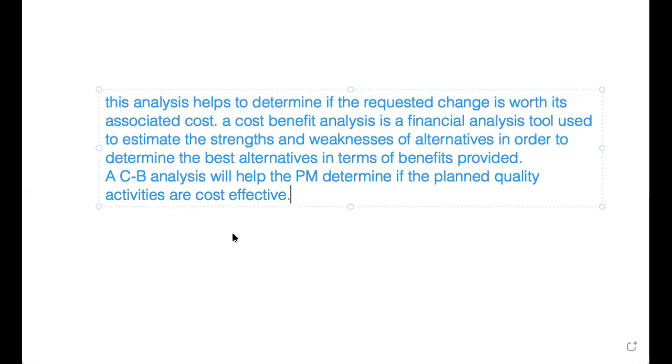There are alternatives to do this work, but if you do alternative one, what is the cost benefit? So the cost you are incurring, and what are the benefits you are getting? What is the ratio of cost benefit in alternative two? Likewise, you can compare and find the best option, best alternative. So this is the cost benefit analysis.